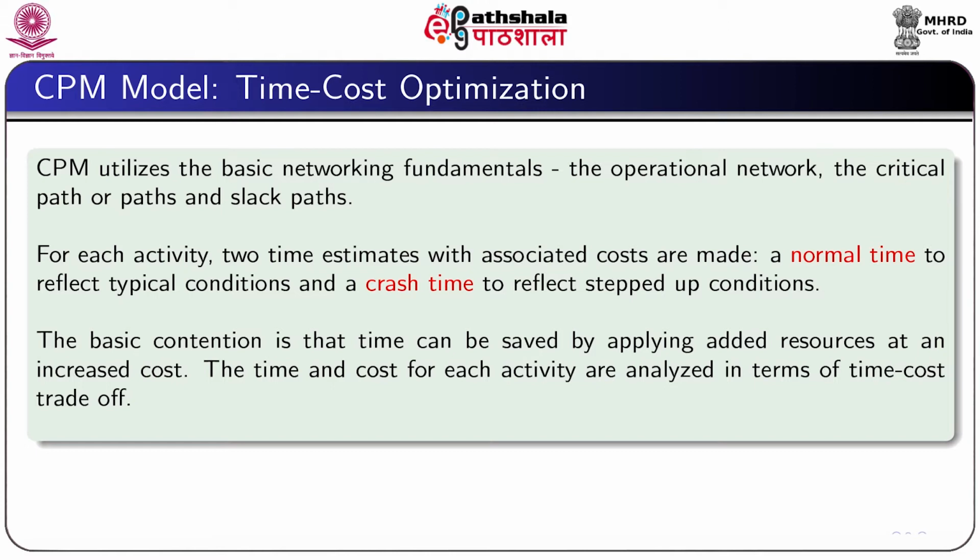A normal time reflects typical or normal conditions, whereas a crash time reflects stepped up conditions. The prime objective is that time can be saved by applying added resources at an increased cost. The time and cost for each activity therefore need to be analyzed in terms of time cost trade-off.